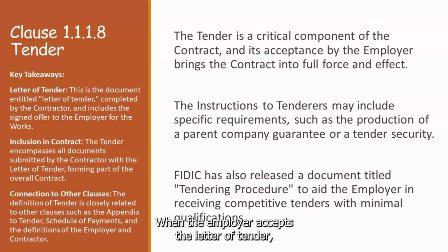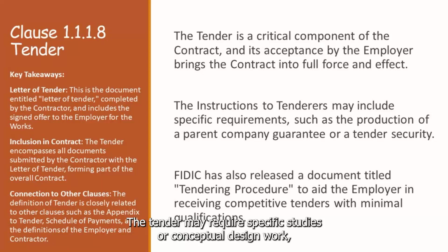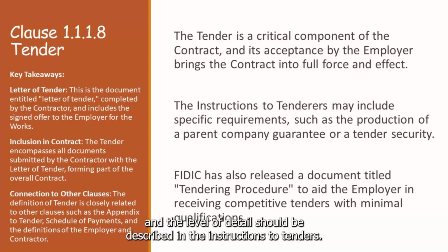When the employer accepts the letter of tender, the contract comes into full force and effect, including the accepted proposal and completed schedules. The tender may require specific studies or conceptual design work, and the level of detail should be described in the instructions to tenderers.